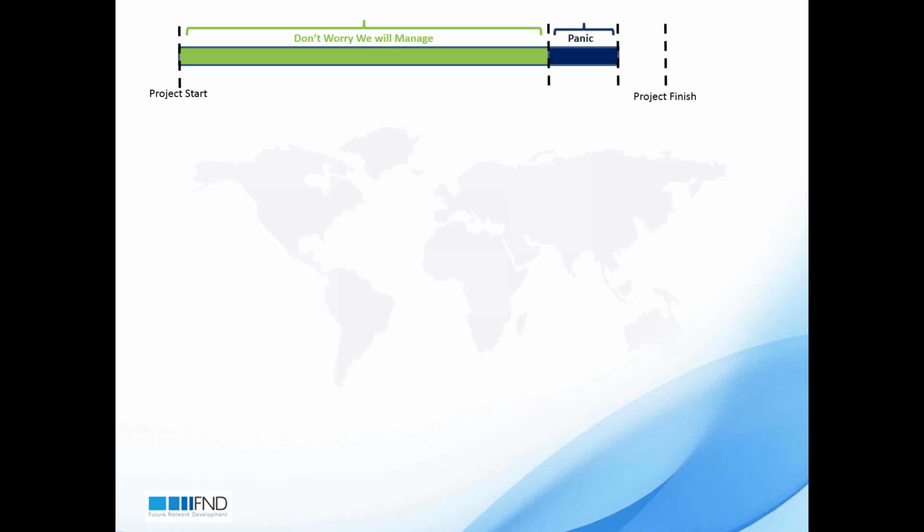After that, people realize that we are behind the schedule, because if 50% of the duration is complete, and when people look at the site, they see 50% progress is not there, people understand the project is going to be delayed, and people panic. And following this, we have a crazy working period. This is a general approach in construction, and it doesn't matter where, every construction project has a similar kind of mood if they do not have a planning and controlling process healthily implemented.